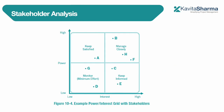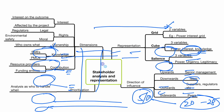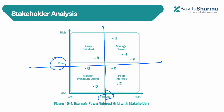Now we will do stakeholder analysis. You have all stakeholders; then you analyze them using the Interest and Power Grid, which is very useful. I asked my stakeholders about their interests — the big boss said 'don't show up, I am very busy,' meaning interest is low but authority is high. So I placed big boss (BB) in the high power, low interest quadrant.